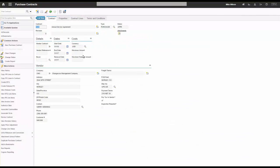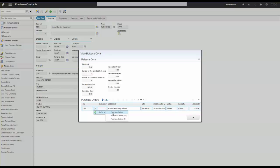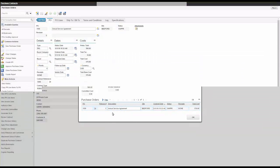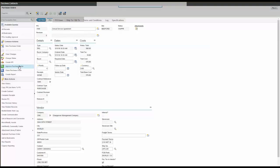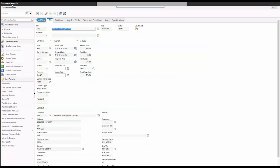I didn't define a maximum amount here, so it's essentially unlimited. But you could set a million dollars for the year and a maximum release amount of say $25,000, so planners issuing releases over time can't exceed that per release — a way to manage spend over time. I'm going to go to this purchase order and approve it. We can set release POs to auto-approve, but in the base system I have this extra step.